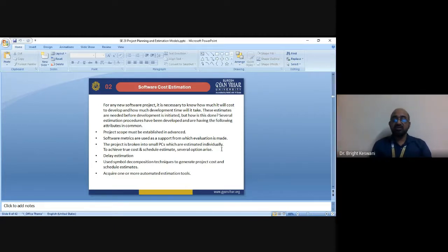And in the integration phase, we can spend less time in a small project, but more time in a large project, because as Boehm suggests in the COCOMO table, if you are having a small project, you can spend 18% time on integration, because integration is not a crucial activity in the case of small projects. But in a large project, it has to be 30%.